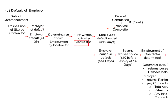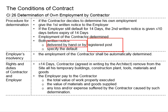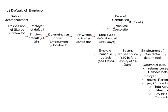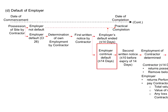When the employer is in default, the contractor will need to send the first written notice to the employer, delivered by hand or by registered post, clearly specifying the default. This serves as a warning to the employer to see whether the employer will rectify the situation. If the employer is eager to rectify it, the employer is no longer in default and cooperates with the contractor, and work shall proceed normally until practical completion.